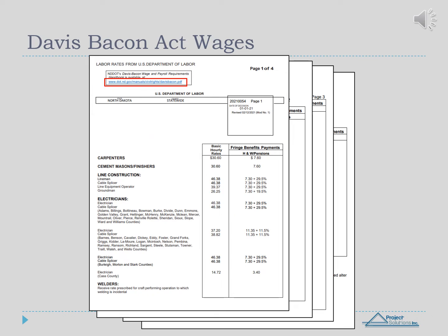The RFP will have the required labor rates from the U.S. Department of Labor for the area. Make sure you take the cost of prevailing wage labor into consideration prior to bidding on the project.